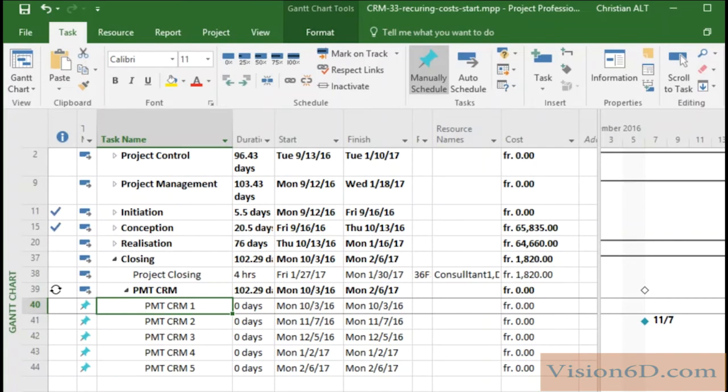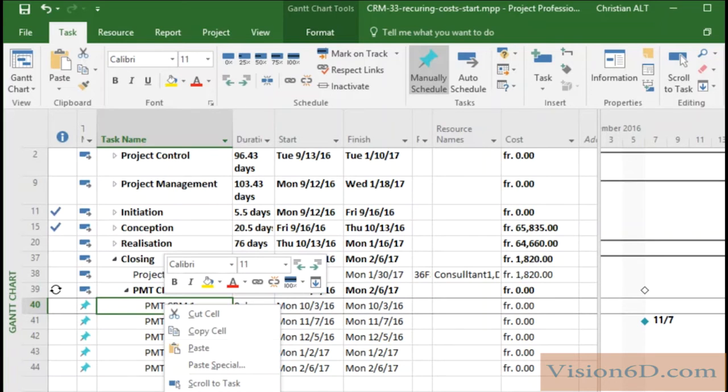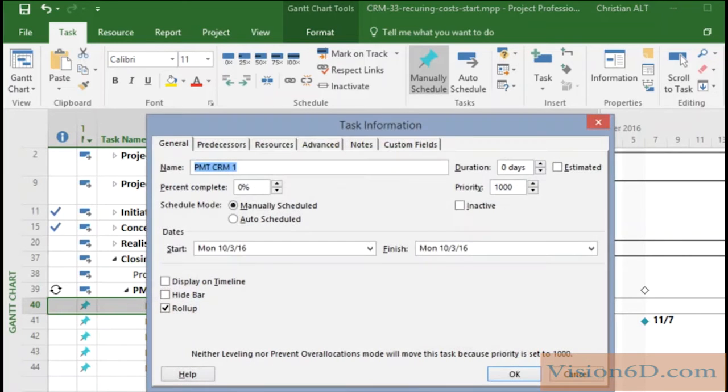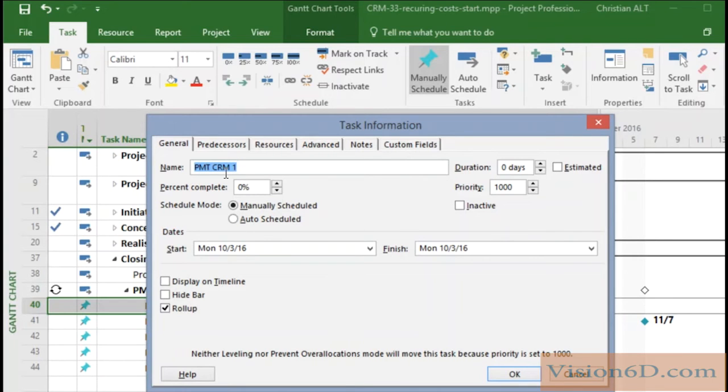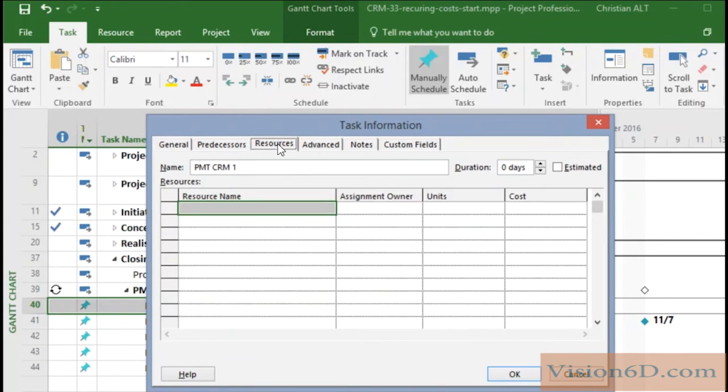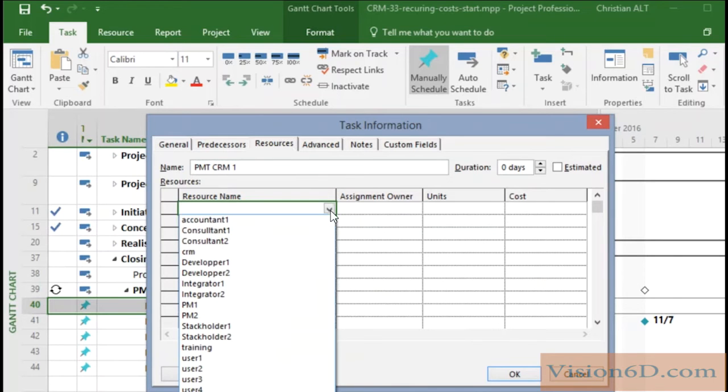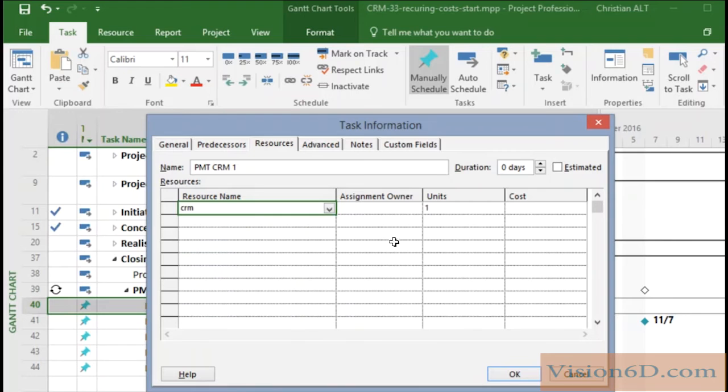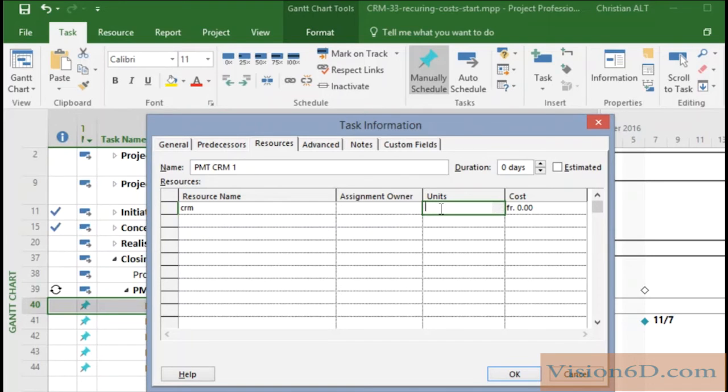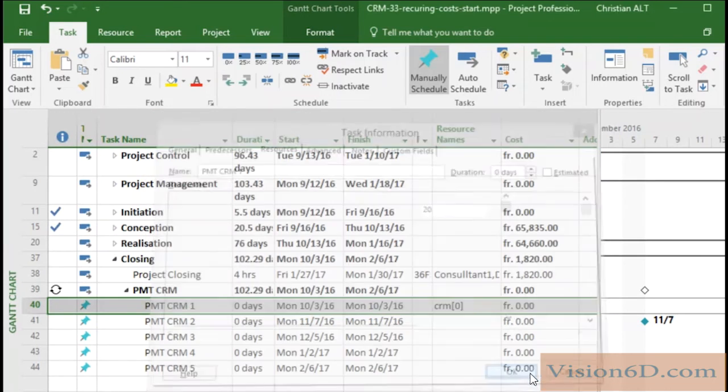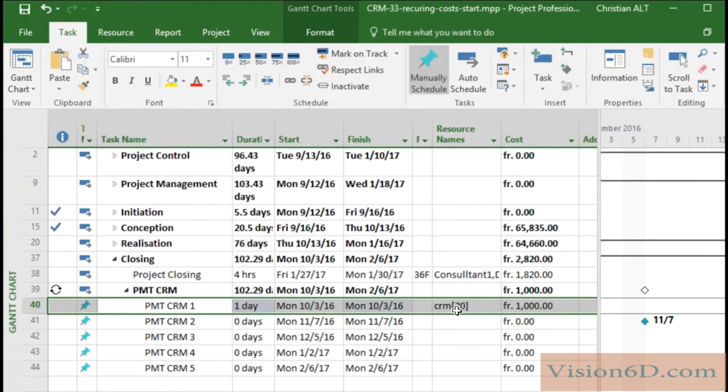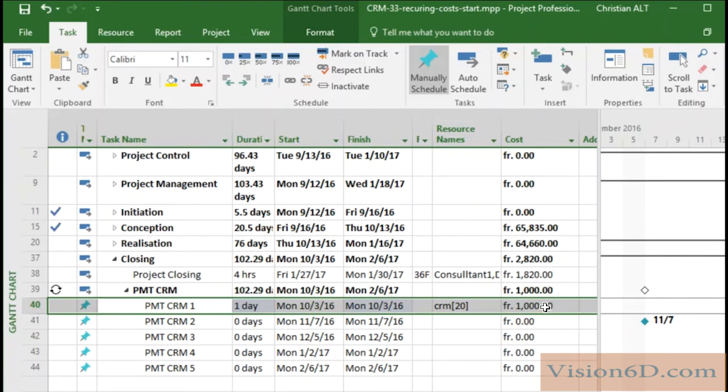We will now go to the information from this first task here. So we see here the first payment and what interests us are the resources. And I will say here that the resource that I'm going to use is CRM. And now we have to define the number of units. So we say 20 units since there are 20 people. Okay. And you see here the change. We have added here 20 units and MS Project has immediately calculated the cost.